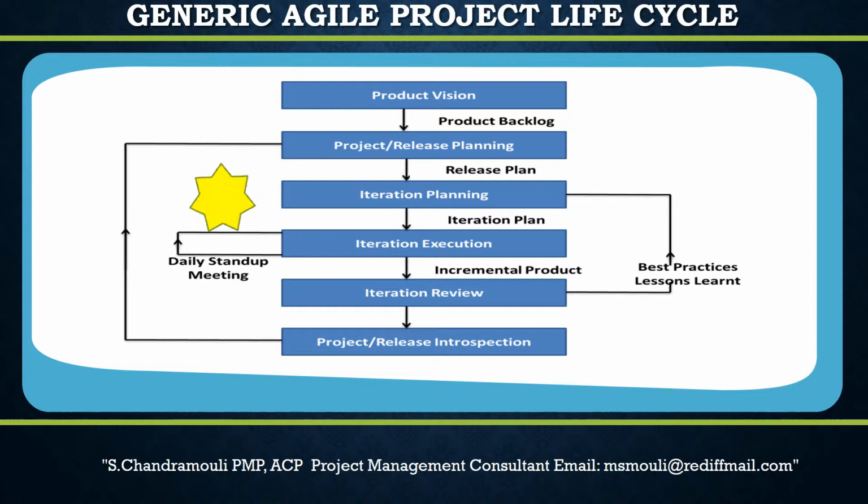Release plan determines the time plan, time box, for each release, and in turn for each iterative cycle, by determining the current team capacity. During release planning, the set of selected user stories, small level of requirements, are split into much smaller user stories that focus on narrow features.